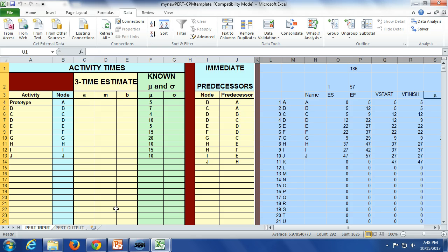If I ask for 14 days, it would be higher yet. If I ask before 16 days, you tell me it's like 99.85% of the time. So it can add some probability to projects. We don't just say, hey, it's going to be done in 100 days. We say it's going to be done in 100 days, and the probability it's done under 120 days is 95%. That's what we tell our boss. So it's kind of like hedging our bets a little bit. You know what I'm saying? Realizing that there's risk associated with doing things, that there's wiggle room. It's not always done the same way.